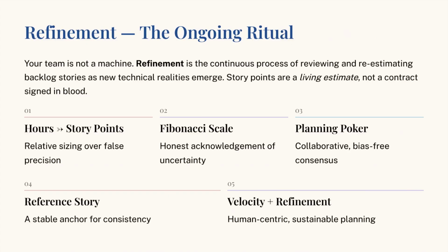Finally, we have to recognize that your team is not a static, unfeeling machine. You are a living, breathing group of people who are constantly learning. Refinement is the process of reviewing and updating your product backlog, which includes re-estimating stories as you learn more about the technical challenges involved. It is an ongoing conversation, not a one-time event. You have seen this at the office, where a task that looked easy on paper suddenly becomes a nightmare once you dig into the old, messy code.